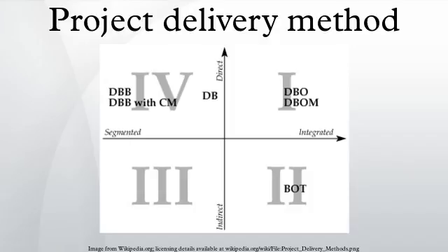Design build operate maintain. DBOM takes DB one step further by including the operations and maintenance of the completed project in the same original contract.